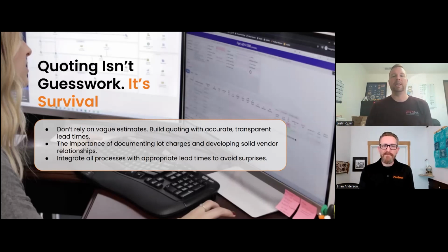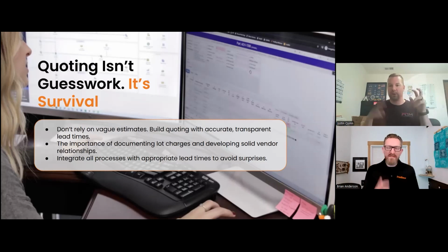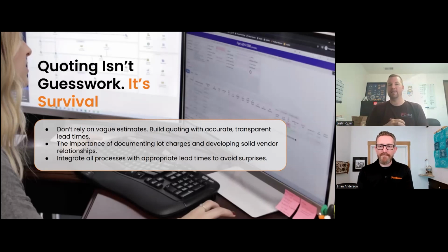And so lead time really needs to be a function of accuracies, and we handle that through our quoting process, where we have lead times in for ordering material. We have a lead time built into our order processing stage of the quote. Of course, machining is always the easy one to dial in because that's what's basically building the quote.